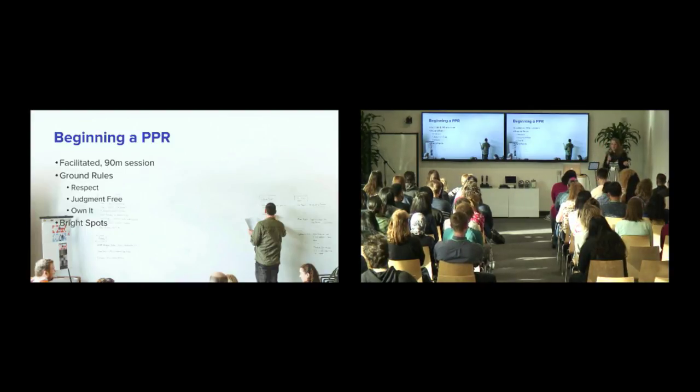We ask a facilitator who's familiar-ish with the project but not on the project team to come in and facilitate that effort. It allows them to be sort of a casual, nuanced bystander. Beforehand, when we had PMs running it, if you're PMing a project, it's really difficult to feel like that neutral middleman when most PMs have really strong feelings about the way that projects have gone.